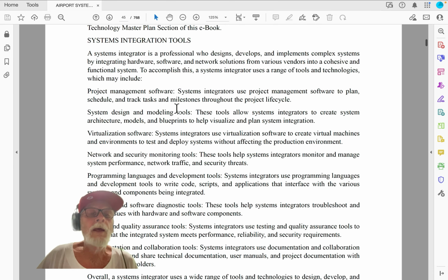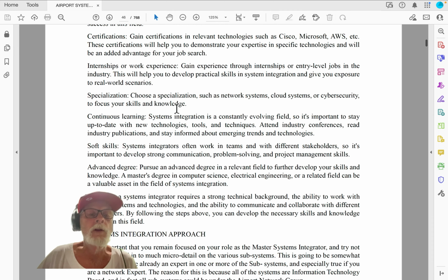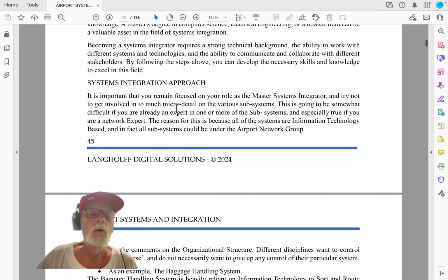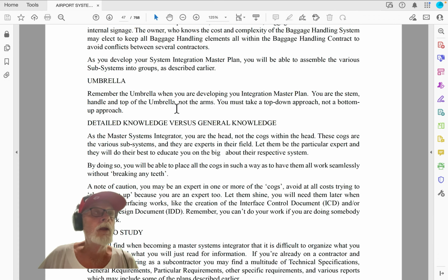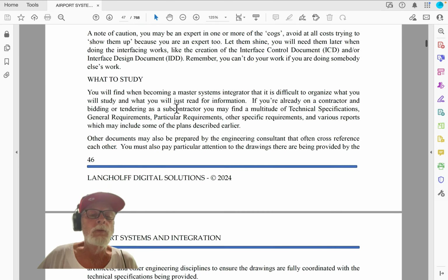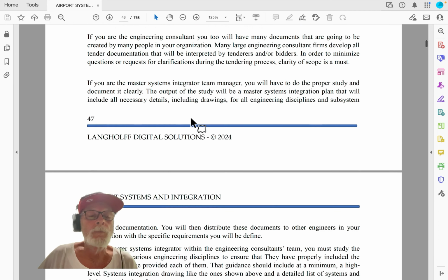And with that in mind, you need to really engage stakeholders. Okay, without stakeholder engagement, you'll be putting in computer systems that maybe the operator doesn't even need, or wants something different. And so towards the end of the project, you'll be making major changes, which will delay airport opening. Again, here's a bubble chart.